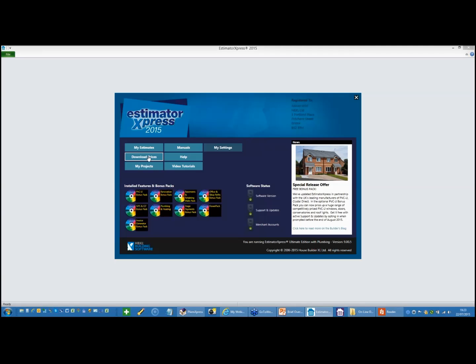When you create a job, you make a copy of that price book, a copy of the specification that you want to use, and a copy of all the workbooks are then loaded into the particular estimate. This means that the prices are actually frozen within that job, so that you can download prices within the library for future jobs, but the actual job that you've got, the price book, is frozen, so it doesn't keep upgrading every time you look at it.